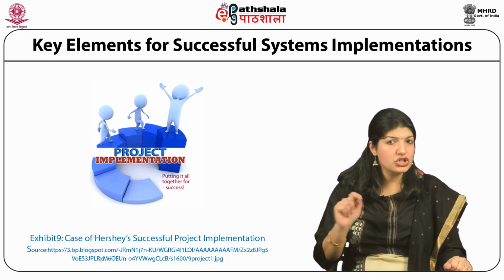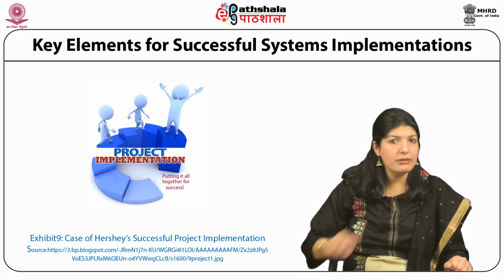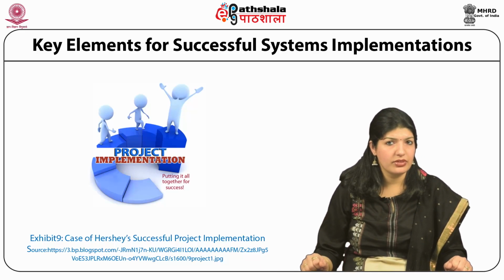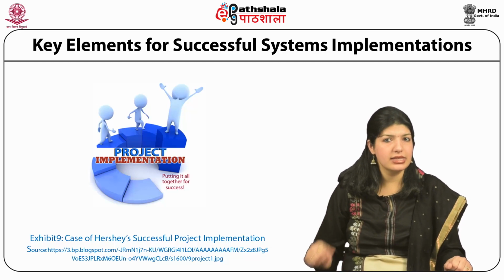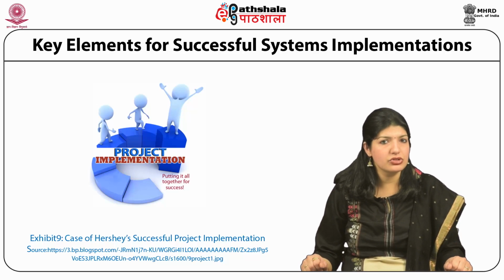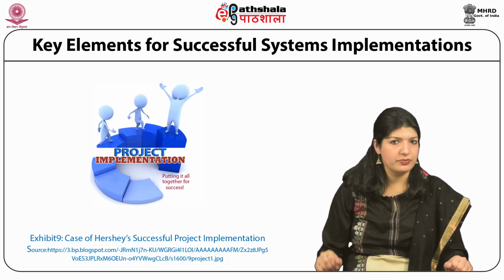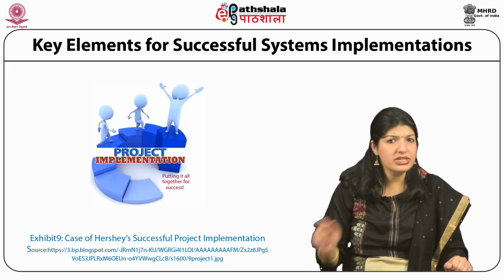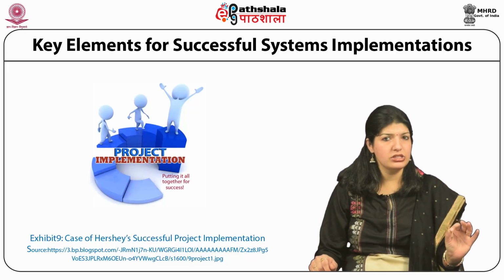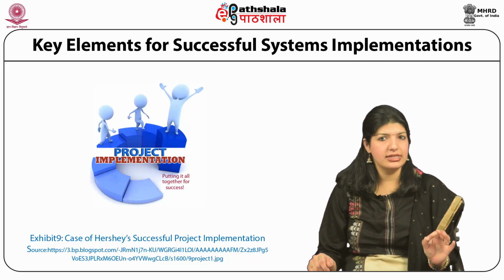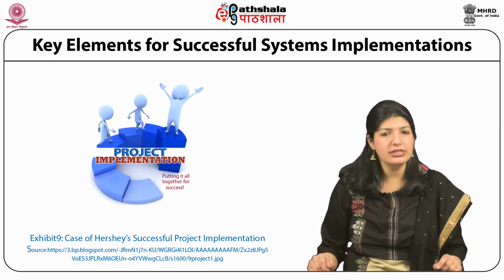Testing is to make sure that the system is functioning as it is designed and must be thoroughly tested. A test plan should be detailed as soon as the designs are completed, and testing resources should be focused on the main functionality of the system. Avoid the common error of focusing too much of your testing effort on complex functionality that may only be used a small percentage of the time.